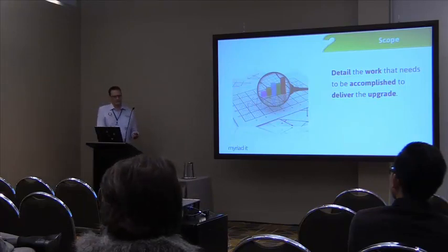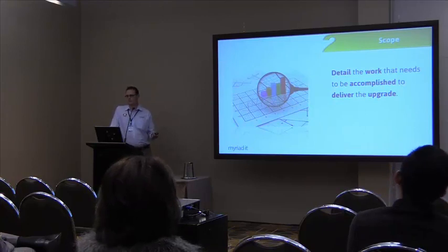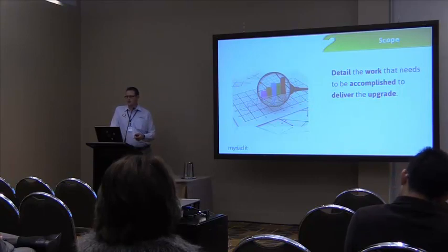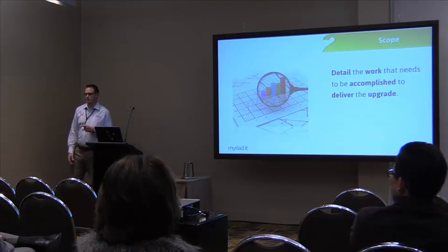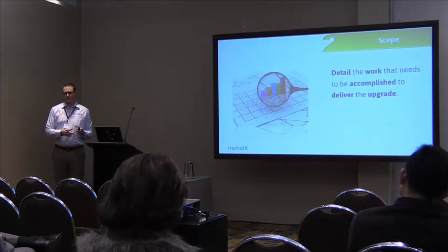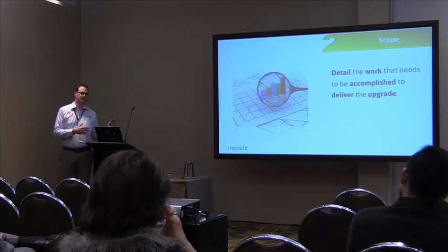And then the last one, which is the other way, is what are my exclusions? Identifying at the start, where am I not touching? What is not changing? Okay. I see this as probably the most critical part, because that's where you're locking down your scope. If you don't lock down your scope or you go outside your scope, that's where your time and costs go up.